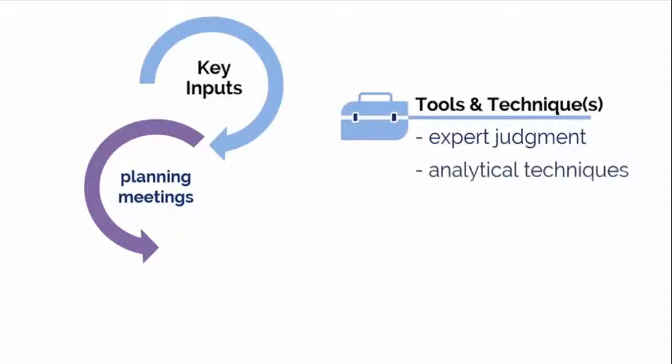Analytical techniques such as NPV, IRR, ROI, and payback period are often useful on projects, such as in the case where we want to know how long it will take to recover our money should we invest in a project. The payback period will tell us a specific time period in which we will recover our initial investment, and we can use this information to decide whether we should accept or reject the project based on the criteria of when we need to be paid back.